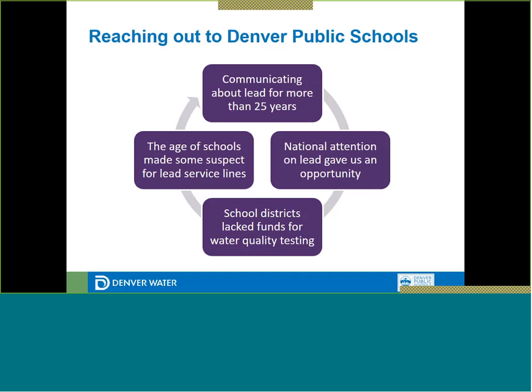With so many schools in our service area, we had to phase this, so we approached the largest district first, Denver Public Schools. The district had been testing water in some schools for a while, and that was to address corrosion concerns, but it had never tested all drinking water sources. In addition, because lead service lines were known to be installed at properties in our community through the mid-1950s, including in some commercial and institutional settings, we wanted to ensure that there were no lead service lines serving some of these older school properties. Next slide.